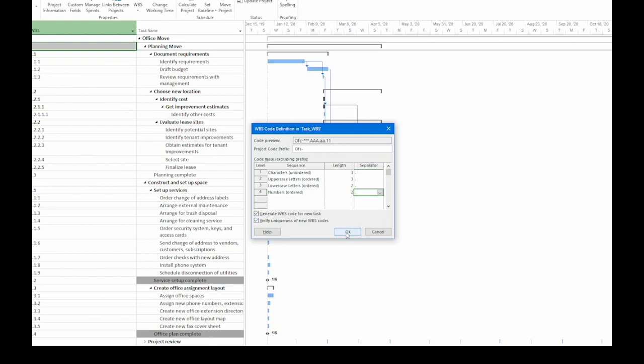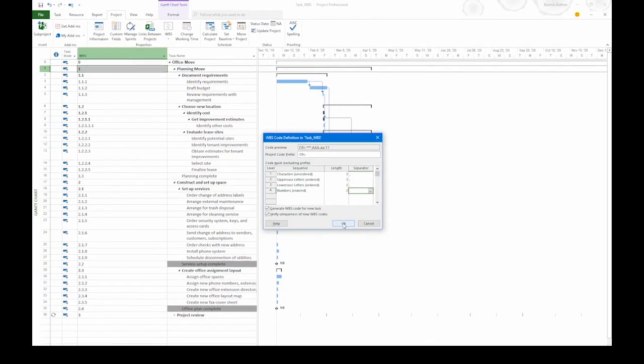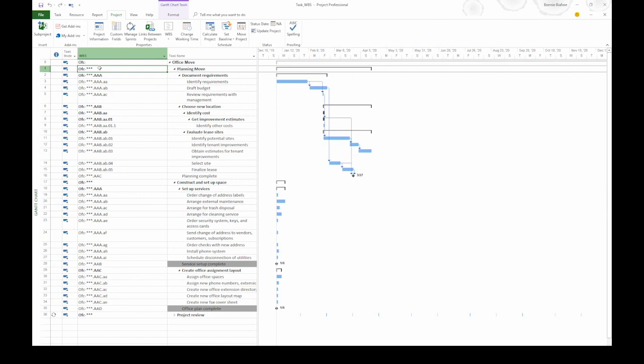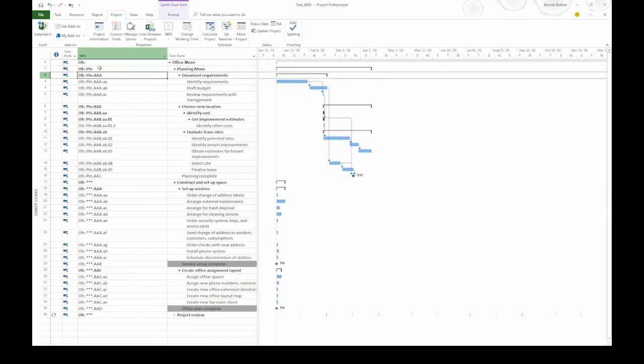Now that we have the code definition done, click OK. Notice that that fills in most of your WBS codes. However, if we look at task 1, Planning Move, you can see that there are asterisks for level 1. That's because of the unordered characters. We have to fill that in. So I'm going to type PLN and then press Enter. Notice that all of the tasks that belong to Planning Move now have PLN in the WBS code.